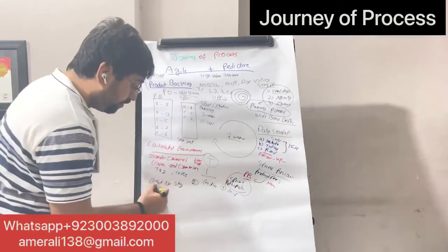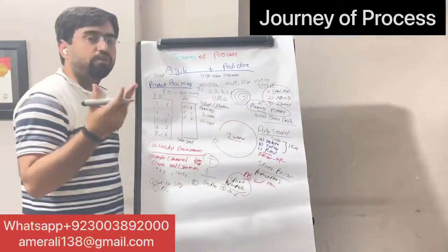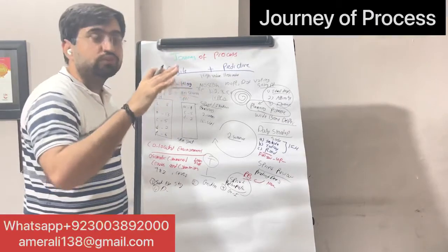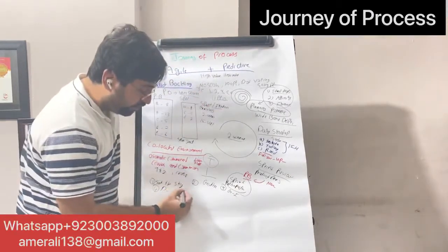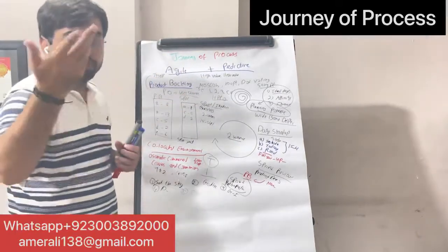In the 4th step, we decide what to do. We decide on 1 or 2 improvements, using a format of what we should do more of, what we should do less of, what we should start doing, and what we should stop doing. And then finally we close the retrospective. We thank everyone, and everyone goes back to their work.